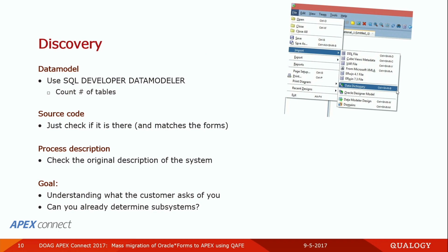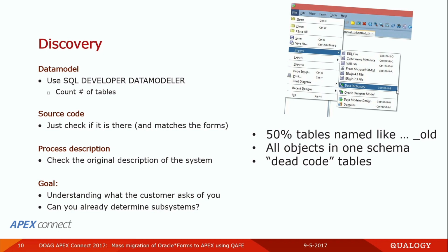Right, the first step, bear in mind that's only 4 hours that you have. I must always emphasize that I must not elaborate too much about what we find in the database. The first step is just opening or letting the DBA open SQL Data Modeler and import the data model. Just to get a glance of what they're telling me that the system is about. And then you get, within the first hour, an idea of, okay, this is going to be a nice project or this is a disaster.